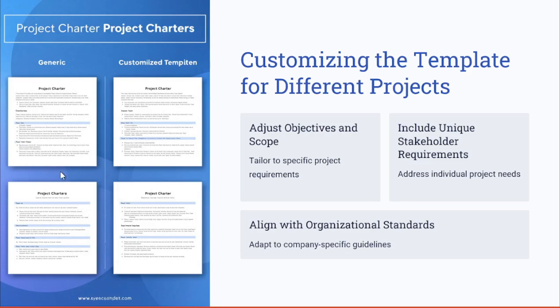As you can see, here is a small project charter example. It starts with a high level introduction about the project. Then the high level requirements, also including the stakeholders that are involved, and identifying the high level timeline and the high level budget of the project. With that, you might need to obtain the stakeholder approvals before it is also approved by the organization itself to ensure the project's existence and kickoff.